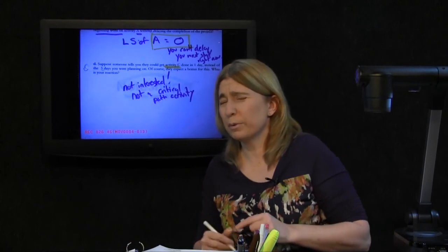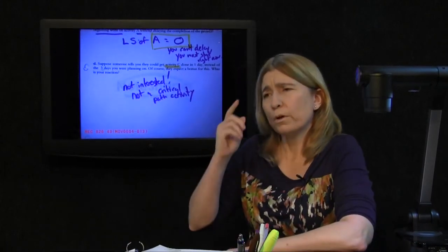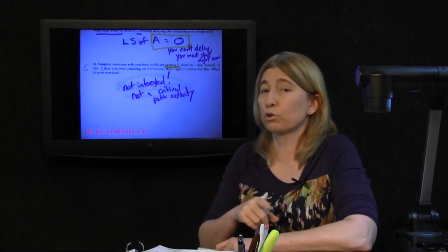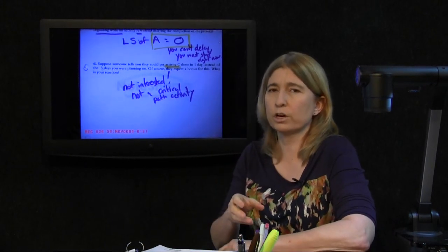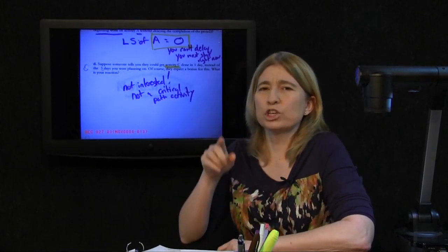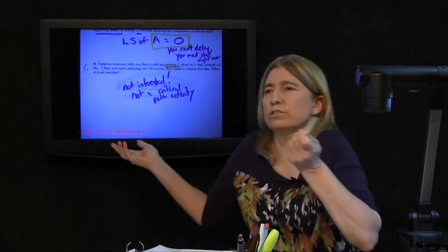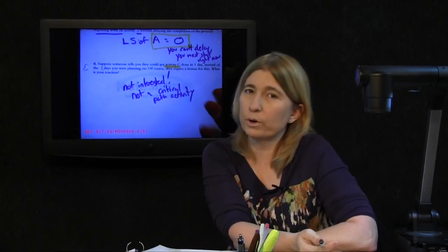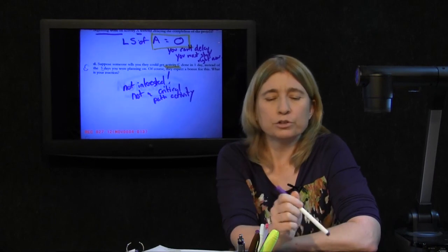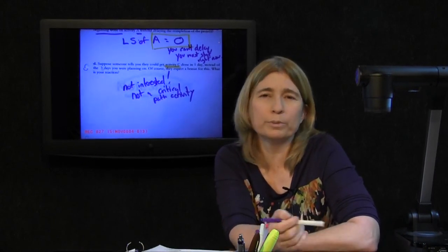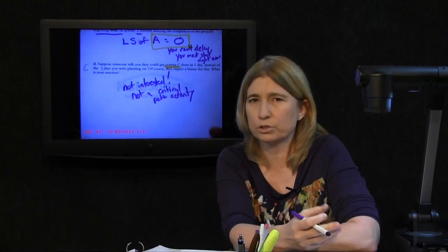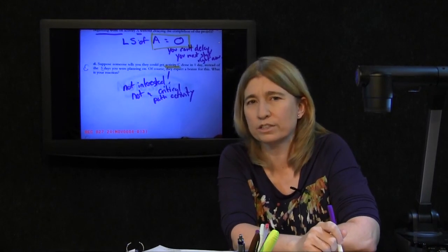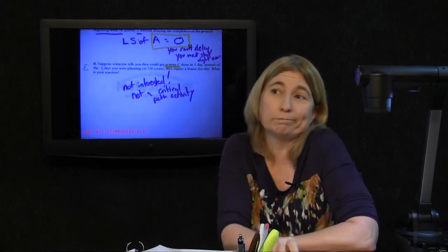Well, what's so special about being on the critical path? What they're proposing, that they could get it done in 1 day, is also known as, good keyword, crashing. They could get it done in a shorter amount of time, but crashing a non-critical path activity doesn't do anything for the project. It does not shorten the length of the project. Another way to state that same principle: to shorten the project, you must shorten critical path activities. C is not one of them, so that is why you're not interested.